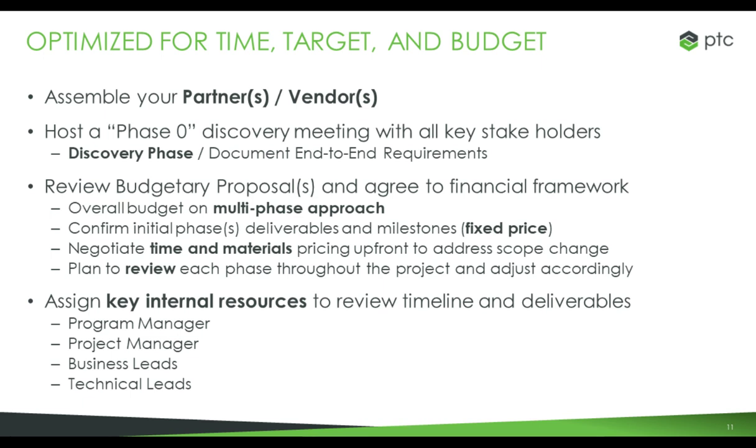Because the worst thing you can do is say, okay, we're months into the project with this one partner on a fixed price. They come back to us, and because we did scope creep or feature creep or whatever, the fixed price is now over. They're now moving into a time and materials basis, and you go into a very high rate for time and materials. It's hard to go back to your sponsor and ask for more budget if you didn't plan for this, or at least be able to make them aware of it before it actually happens.